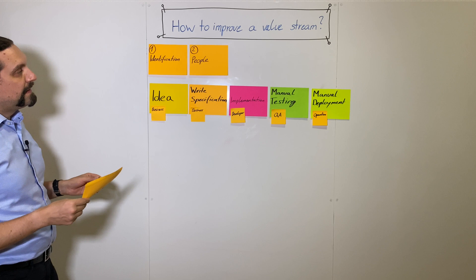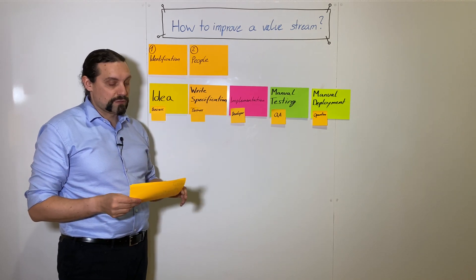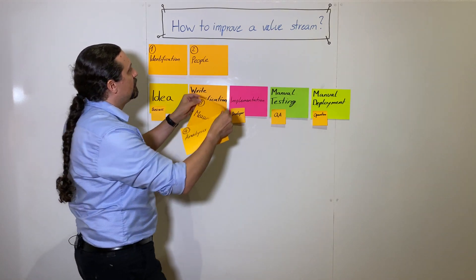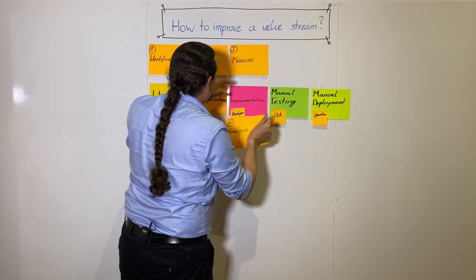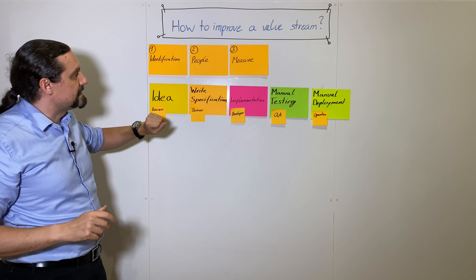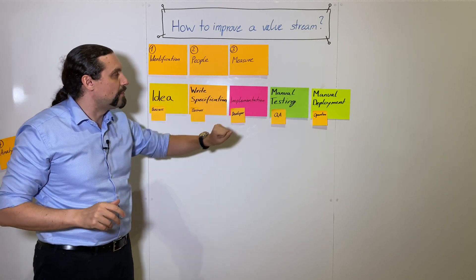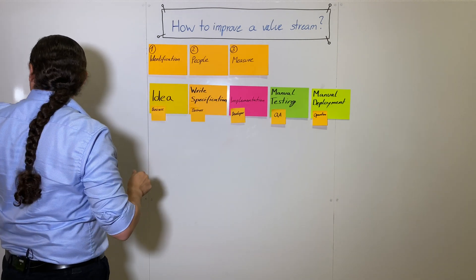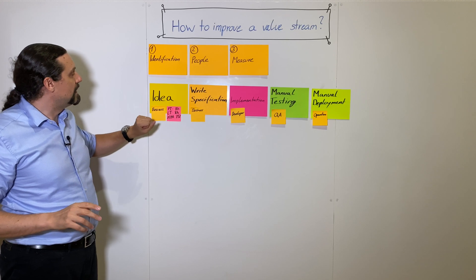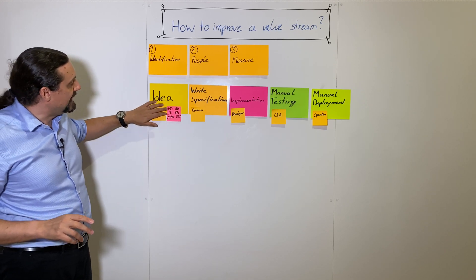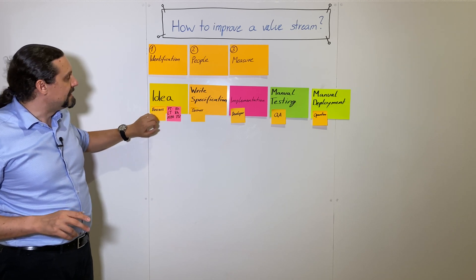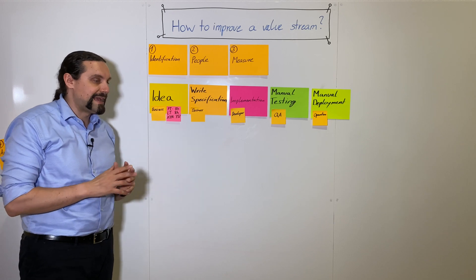When we have done the identification of which people are working in this value stream, we are going to measure. We are going to measure how long it takes for such a value stream to operate. We measure how long it takes to create that idea, and for that we are going to look at the process time, the lead time, and the percentage completed and accurate.